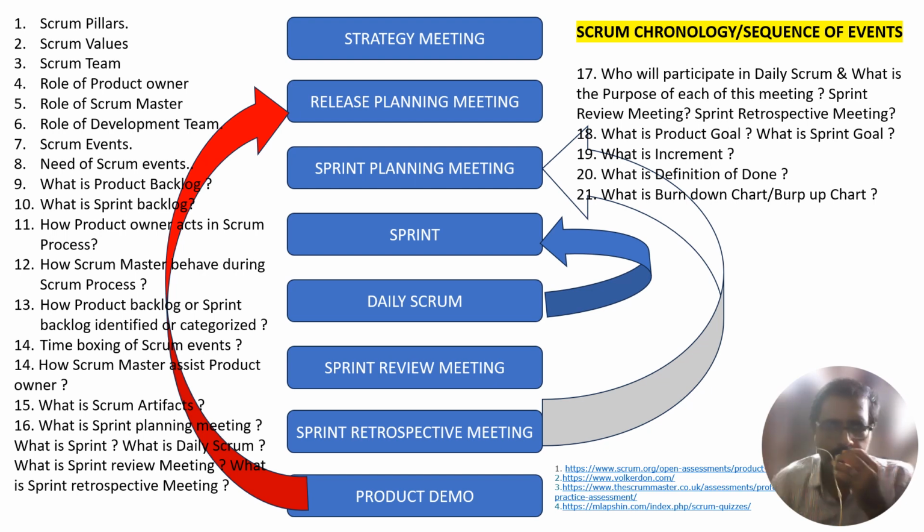More learning cycles limit the risk of cost and effort to a smaller time frame. Each sprint may be considered a short project. Various practices exist to forecast progress, like burn downs, burn ups or cumulative flows. While proven useful, these do not replace the importance of empiricism. In a complex environment, what will happen is unknown. Only what has already happened may be used for forward-looking decision making. The sprint could be cancelled if the sprint goal becomes obsolete.